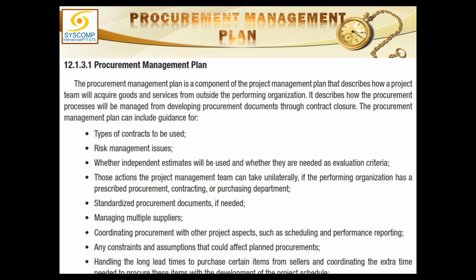We cannot expect right from the date of signing of the contract that the things would be starting the next day. If the machines are required, they are taking 6 months. Until and unless those machines arrive, we cannot move ahead with the work of the contract. Therefore, it should be so well planned that all the orders are placed well in advance, and we can keep doing certain activities which do not involve those machines which are being procured.